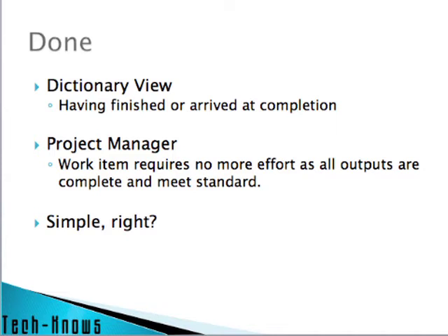So in a project, you break it down into various steps. Every step has input requirements. What are the things that need to be there before that step can start? And what are the things that need to come out of that step so that subsequent activities can take place? It sounds real simple, right?